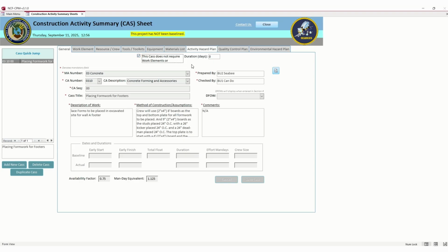You can use that. If it's a milestone, then you leave it at 0. And your milestone could be like, this is where we're going to turn over. That's where turnover starts. This is when we're going to start the project back up. Milestones are just things like that. If you are putting it in here for informational purposes, you need to order concrete or order something else, you can create that by using this little mark here.